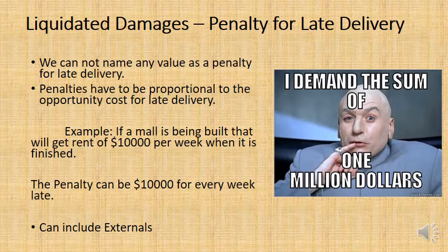Now, those penalties need to be proportional to the opportunity cost for late delivery, but it can include externals. So let's say you're the engineer for the government and you're trying to get contractors to bid for a tender to build a motorway. Well, the opportunity cost of a late delivery isn't really going to be felt by you because you're not going to be charging rent.